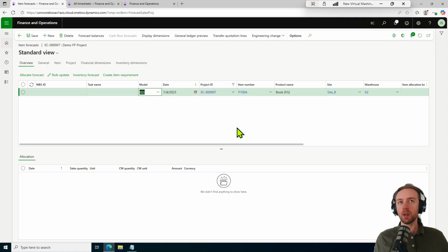Well, it's really going to align manufacturing operations with project timelines, the budget, deliverables, by placing everything essentially under one roof, which is the project itself. Instead of having our ledger transactions and data associated with this production order mixed up with every other production order we're creating in the system, we're able to separate out this particular item and its associated transactions in a separate house, in a different project. So the costs are going to be recorded against this project.